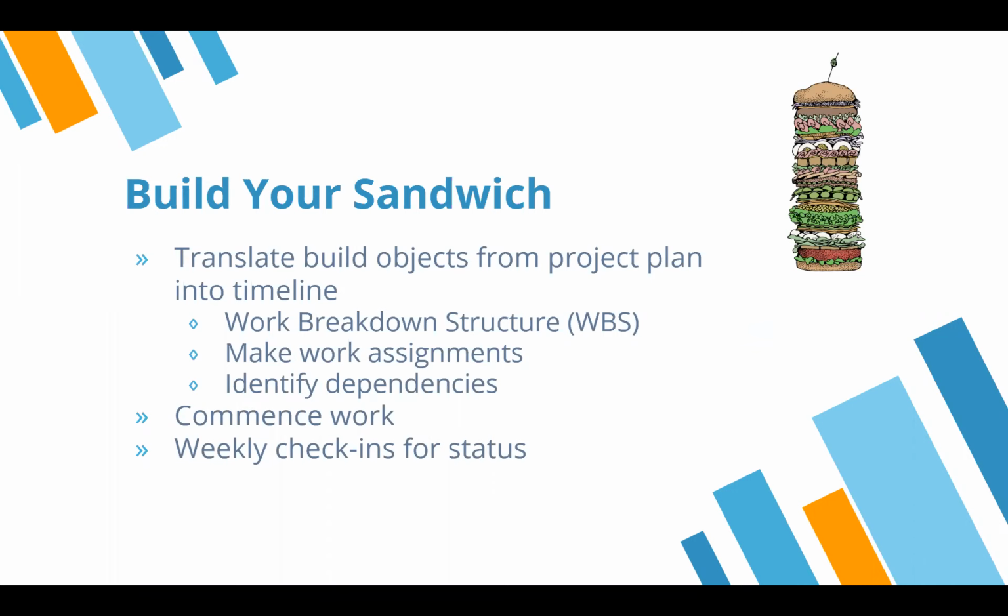So again, it's not like it doesn't happen in the environment. A lot of times things change or things just happen, but you have to account for anything and everything that possibly can happen. And oftentimes that's one of the things, making those work assignments and making sure those estimates are good. And then also you want to define any relationships, or we call them dependencies, and Microsoft Project calls them predecessors, that have to happen before other things. Again, if you're going to snap your piece into somebody else's and that piece isn't there, you don't want to be sitting there waiting for that component to be finished.